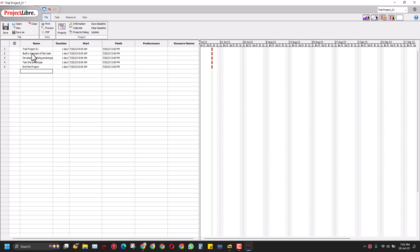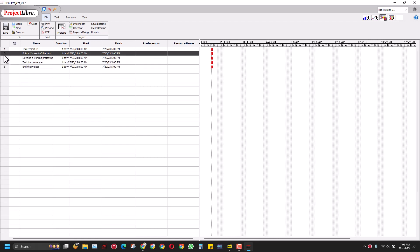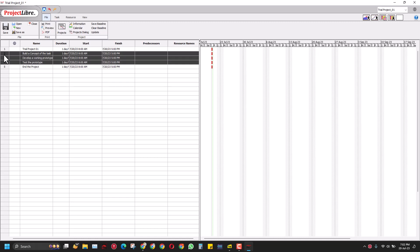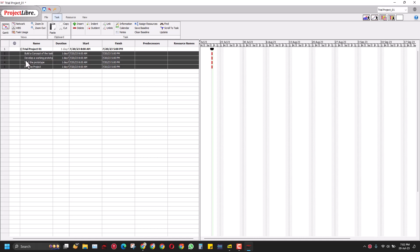How do I link these activities and place durations in these tasks? You can click here on the left side and drag to select, or click here and then go to shift and press the down arrow to select all these tasks. First, go to the task option in here and press indent. What that does is it links all these tasks to the primary name of the project, which is the trial project. We can also link these activities because we know that when one activity ends another activity begins. We can click link, and you can see that when one activity ends the other begins and so on.